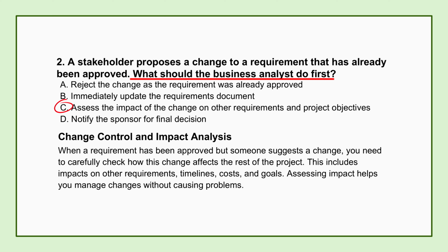I like that emphasis on not just approving or rejecting straight away. Why is that impact piece so vital before making the call? Well, think about it. Requirements aren't usually isolated islands, are they? They're interconnected. Change one thing here, and it might break something over there. It could blow out the scope, mess with the timeline, the budget. It might even undermine the whole reason you started the project. So assessing impact isn't just ticking a box, it's actually managing risk. Absolutely. It's about protecting the integrity of the solution and making sure you still deliver on the actual goals.